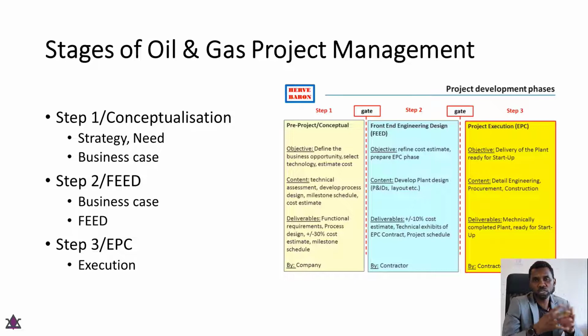Maybe you start with 10 projects and you use various metrics, probably the cost, the distance, the return on investment, the payback period, how many issues it actually solves. All of these are quantified using project management standards, and a selection is used to pick out the project that performs best based on all the metrics that have been put together.